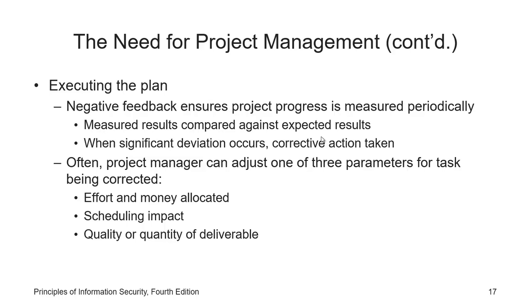They can adjust the effort and money allocated. They can move money from one activity to another just to make sure that we have the budget. So in case that we have extra money in one activity, I can move it to another activity that lacks the money or lacks the effort. I can move people from one activity to another to make sure that the implementation is being done correctly. So it depends on, again, the project manager and their skills of balancing the money and the resources for the project. They can move the stuff around.